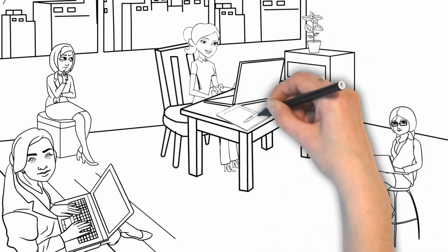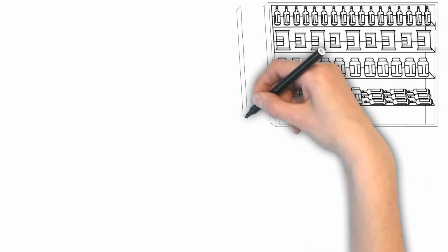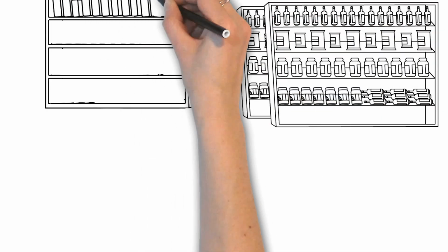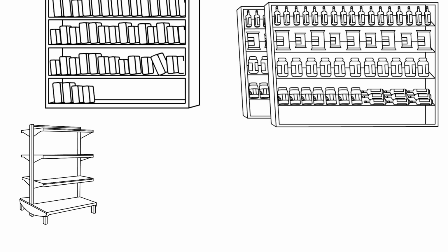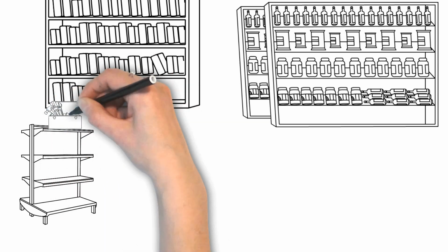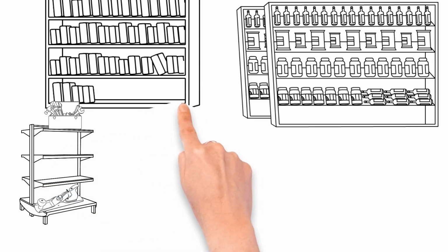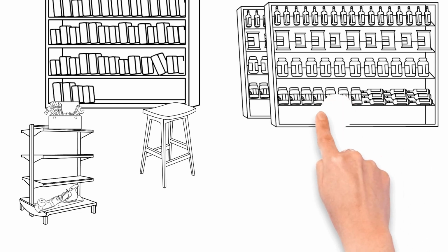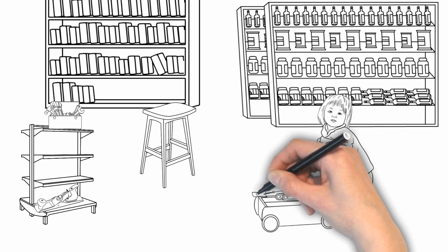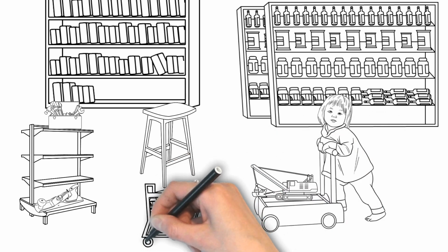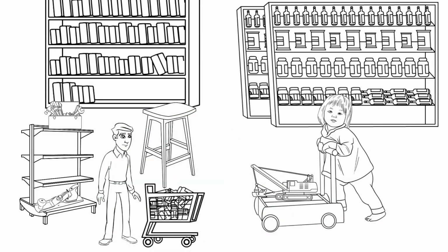There are procurement processes to help you with the arranging of these contracts. Materials and services that are well defined and industry standard are often acquired through picking from quotes or a more sophisticated RFQ, request for quote, if the dollar value hits a particular threshold in your organization. Your organization will have guidelines for such, but in basic you will be either asking a few companies for a quote for specific services or inviting a number of companies to quote in a more controlled, sophisticated industry method of getting quotes for your organization. Again, it is your organization's policies that dictate which you should use.